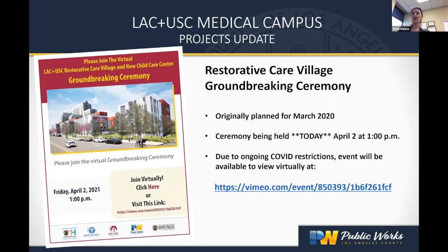Great, and our CEO, Jorge, mentioned this earlier. We are having the groundbreaking ceremony today for the Restorative Care Village and for the Child Care Center. And I know there's a little bit of irony in that because you see all this construction, and I've just reported this construction that's already been going on for more than a year. That's because our groundbreaking, unfortunately, was scheduled for this time last year, and that was really right at the beginning of all of the impacts we had with COVID. So we've had to postpone that. So we're really excited to finally get that underway.